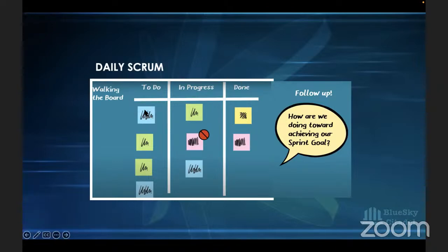So instead of you saying, okay, Ben, what did you do today? Ben, any updates? What are any impediments? Instead of you doing all those 3 questions, you could just check the board. Okay, we have this in progress. What's going on with this ticket, guys? Oh, we have a blocker. What's going on, guys? Oh, this is still to do. You just walk through the board. It is a good technique to help the team stay focused, and it targets the work done, like I said, rather than the individual.